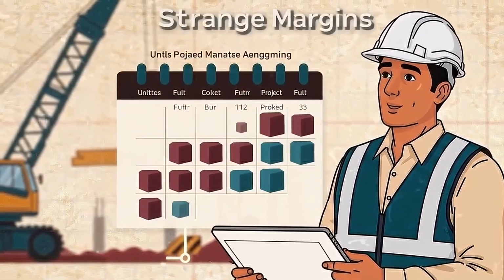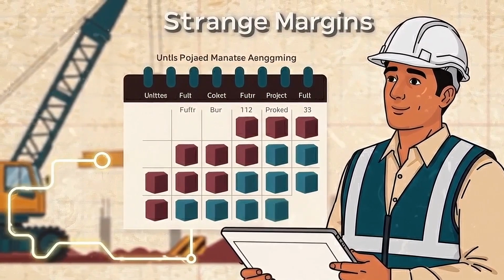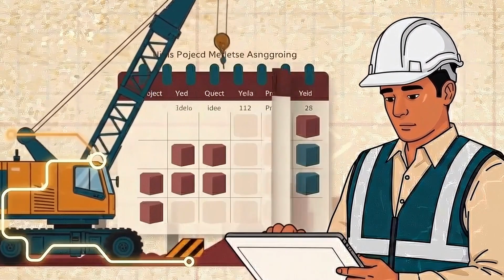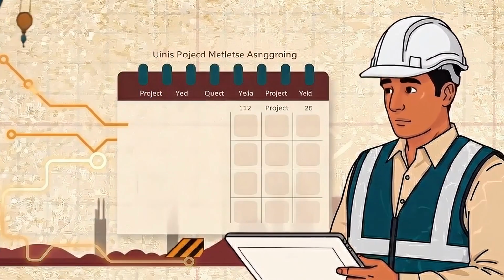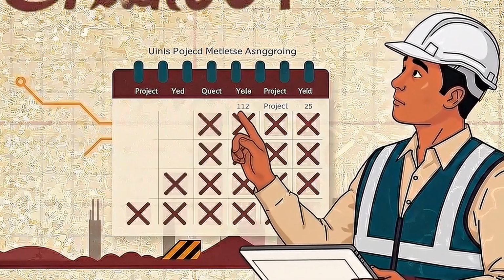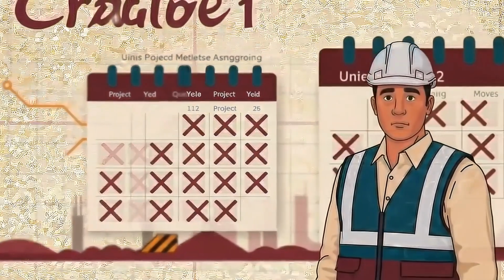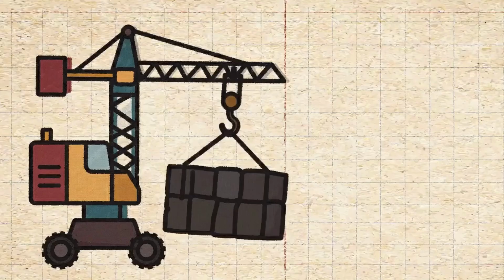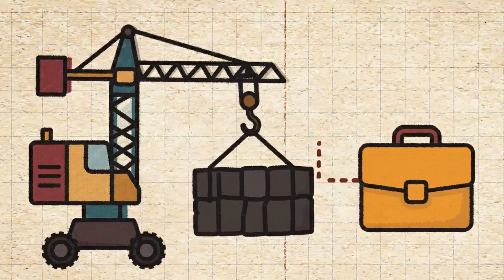A 2025 Steuben County, New York crane rental bid shows a different structure. It called for mobilization and demobilization to be included in an all-in rental price, and it required contractor-attributable downtime to be credited back to the county. Again, different contract, different allocation of risk.